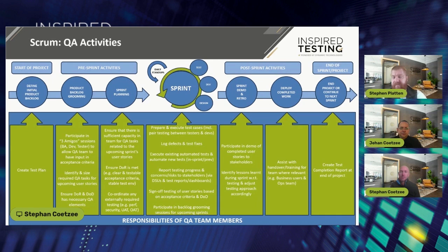So that can create a problem with technical debt, where you're accumulating lots of minor defects and minor problems as the sprints progress, and you're building up this big backlog of technical debt in the background, which needs to be fixed. It often leads to, I've seen, refactoring sprints where they will just take all the existing defects that weren't closed in the last, say, 4 to 5 sprints and just work on those and nothing else. I think it can be quite difficult to maintain the balance between producing new features and fixing existing lower priority problems in the background that the business isn't that concerned about.